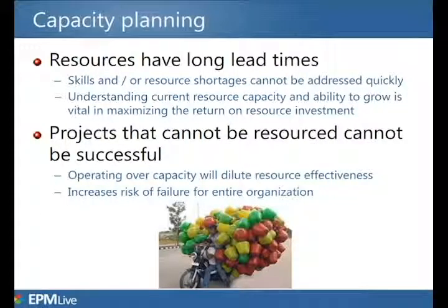If, on the other hand, we need 20 people and we've only currently got 5, that's a lot harder to deal with. Not only do we have to find a lot more people, probably guaranteeing that we have to go outside of the organization, but we're going to make a tremendous impact on the dynamics of that team. We're going to take a team from 5 to 20. There's the logistical issues there about where they're going to sit, getting them computers, but there's also those team dynamics issues. So the capacity is harder for that team to be able to absorb this. It's going to take longer for that growth to happen, and we need to be able to plan for that.